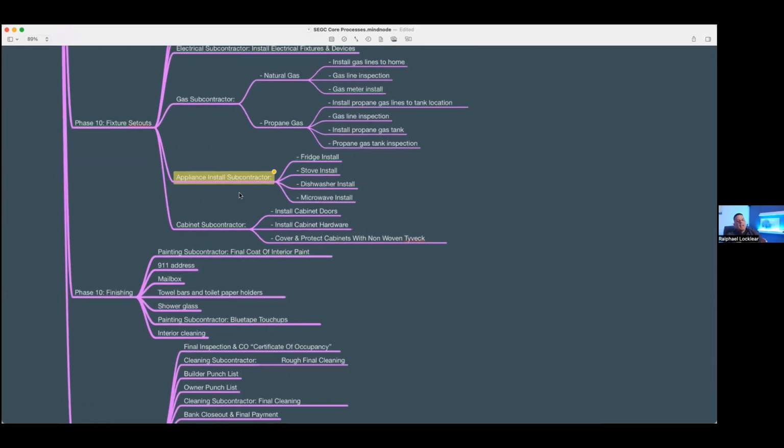And we have to verify that every one of these stages is doing everything that they're supposed to be doing, and get video proof that everybody's doing everything that they're supposed to be doing at the stage that they're supposed to be doing it in, before we allow them to submit their invoices and, of course, get paid. Right? So the reason we get paid the big bucks is because we're documenting and mastering all the little details.